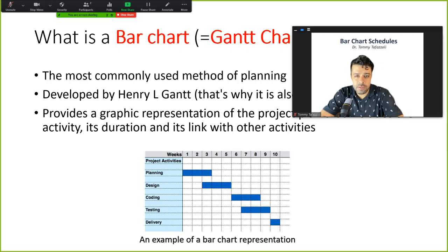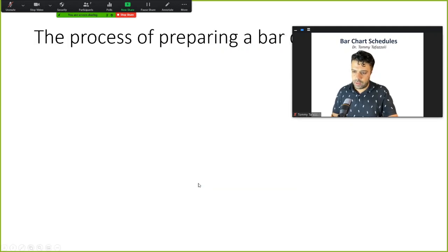Why? Because of two things. Number one, productivity is significantly compromised when the job site is overcrowded. And number two, in an overcrowded job site, safety is compromised because there are lots of people. So the machines, the operators have to watch them, and there is a much higher chance of accidents. Okay, so the scheduler should do their best to mitigate overcrowdedness in different job site locations.